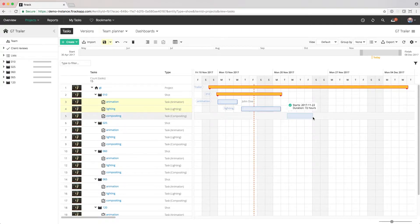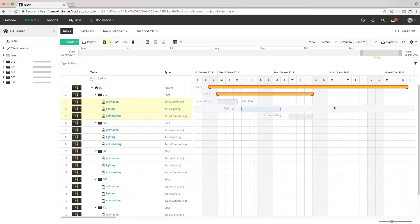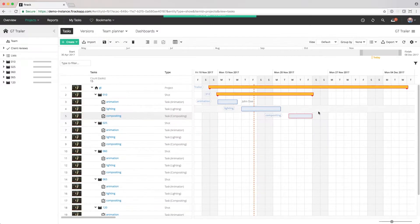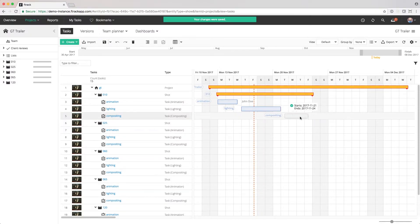The Gantt tool can be used to set start and end dates of individual tasks if they don't already have the date set. If a task already has dates set, we can move it in time.